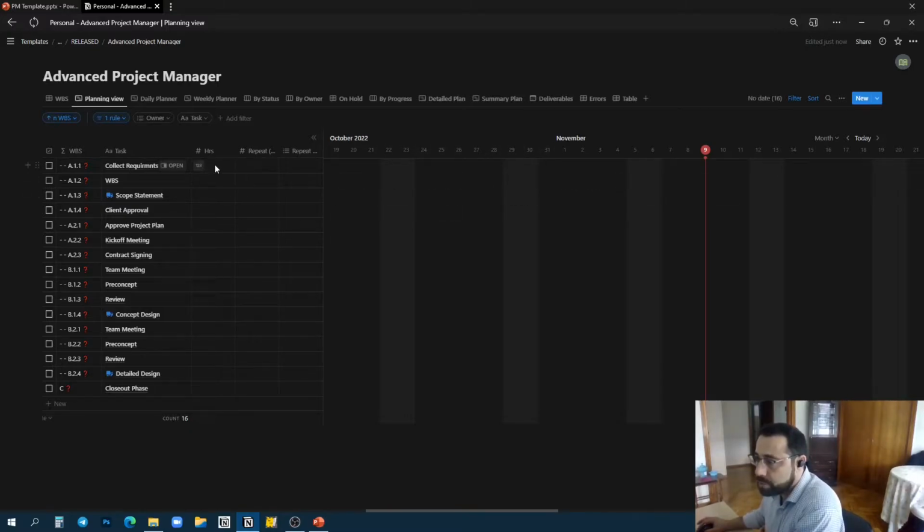So you start by estimating the needed work hours for each task. We're not talking about daily working hours, how many days I need. No, how much total hours you need. If you sit down, do nothing but work on this task from beginning to end, how many hours it requires. Even if it goes over a period of time, it doesn't matter. So let's say I need 20 hours to collect requirements.